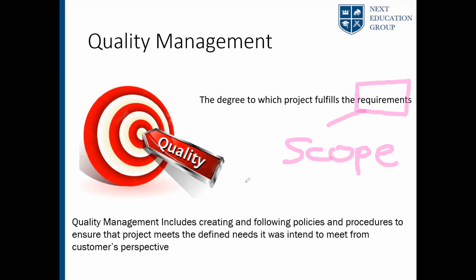Yes, sometimes you don't really, if you say 10 seconds, you might do 9 seconds, 11 seconds, slight variations. But if you are spending a lot of energy to satisfy the customer, going above and beyond the scope requirement, that's gold plating, because that's effort, that's money for your company that you would invest in as well, right?